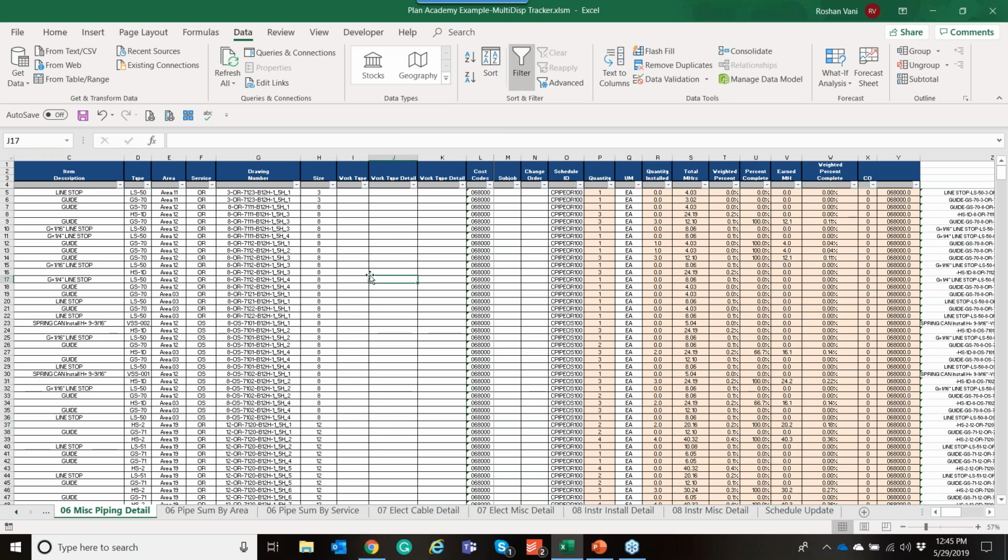Steps will not let you put units on it, only resources, right? And so if you start trying to break down every single resource and every single kind of cost code and an activity group in the resources, then trying to get that input in a logical fashion from the field team is just going to kill your project controls team.